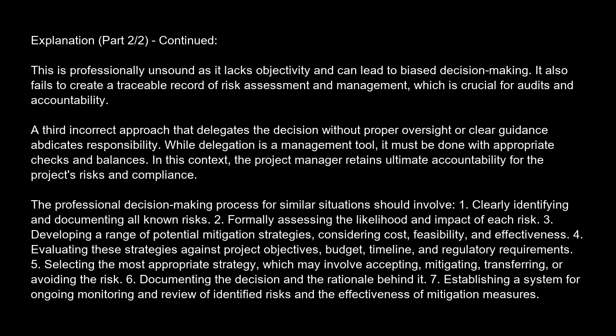5. Selecting the most appropriate strategy, which may involve accepting, mitigating, transferring, or avoiding the risk. 6. Documenting the decision and the rationale behind it. 7. Establishing a system for ongoing monitoring and review of identified risks and the effectiveness of mitigation measures.